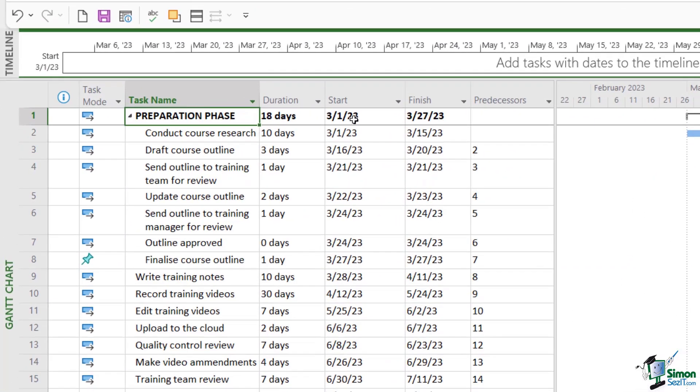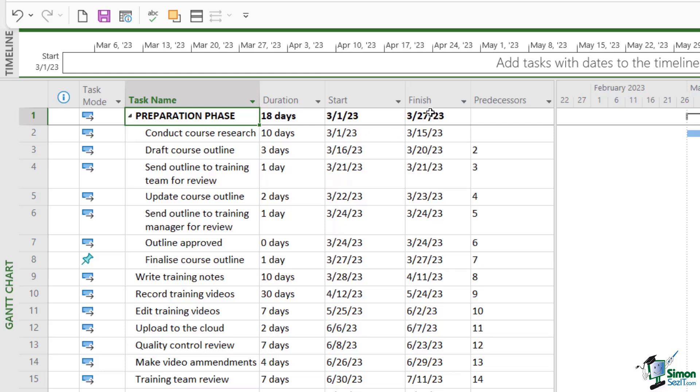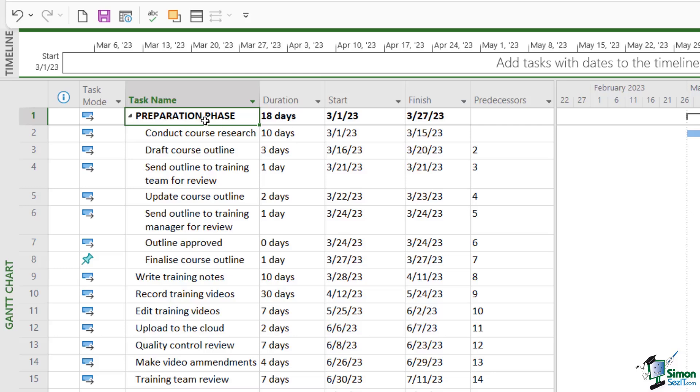So the summary task is basically going to show us the duration when we add up all of these subtasks below. And the start and finish dates for the summary task again is going to be determined by the subtasks below. So the start date that you see up here for this summary task is going to be the start date of the earliest task in this group. And the finish date is going to be the finish date of the latest task in this group. So we don't really have to go in and edit anything for summary tasks because it's all determined by the subtasks below.